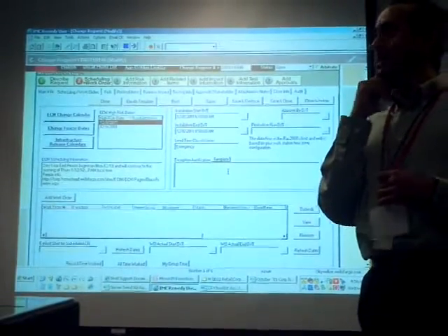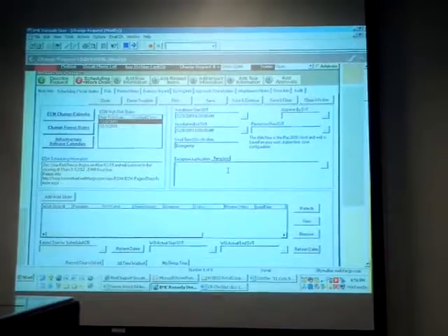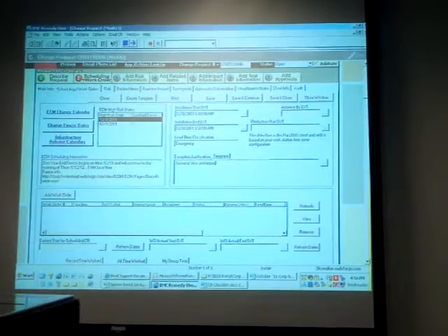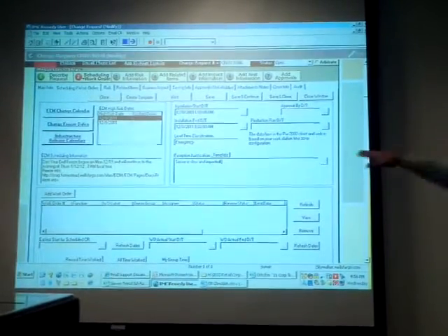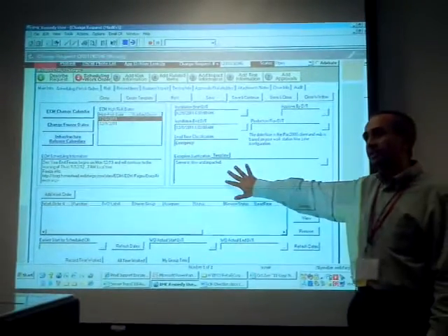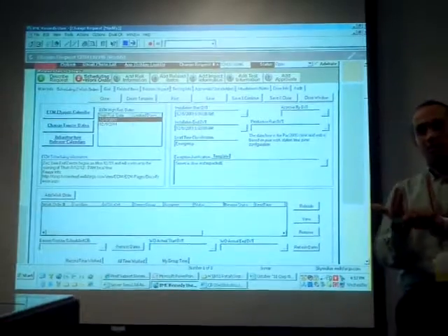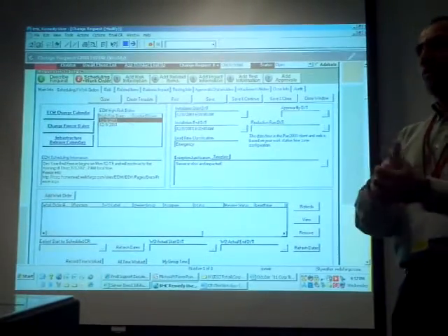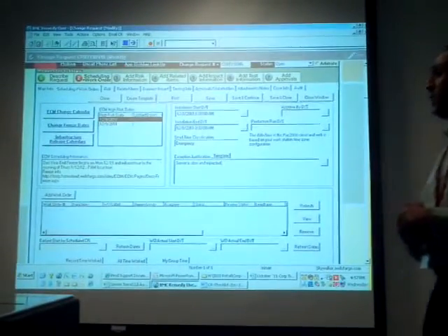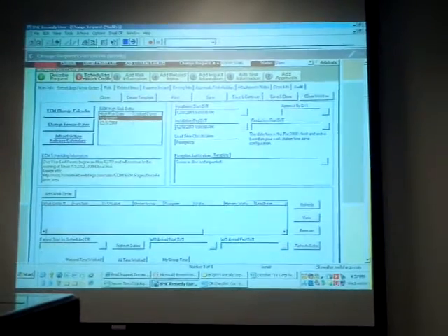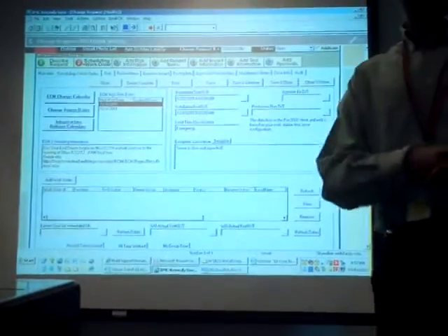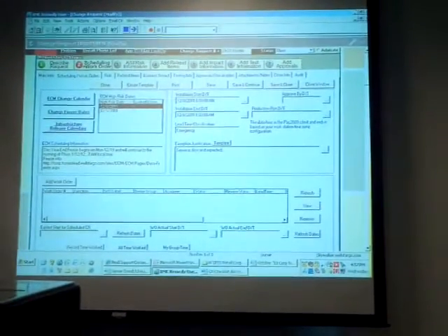Everyone getting it? Yeah, freeze dates don't apply to emergency changes. So I'm going to put in a justification. This has to be a little detailed, not a one-liner. It has to be a little descriptive. Why is this an emergency? So indicate application impacted, echo incident number, see related problem ticket, VMware tools is missing, needs to be installed. Makes sense? You've got to justify why this is an emergency. Do freeze dates apply to emergency? No. If there's a production impact, nothing applies. You've got to recover the customer.